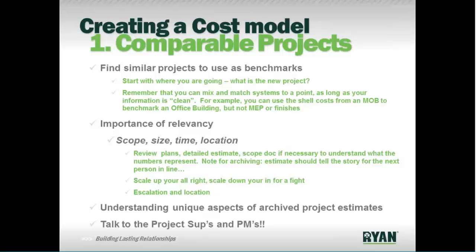Size, again, it's best practice to stay within the similar scale, if at all possible. As you know, the economies of scale can play into it. They're kind of break points. My observation, there's no science to this, but my observation is anything under 20,000 feet tends to carry pretty high dollar per unit just because of the small quantity.